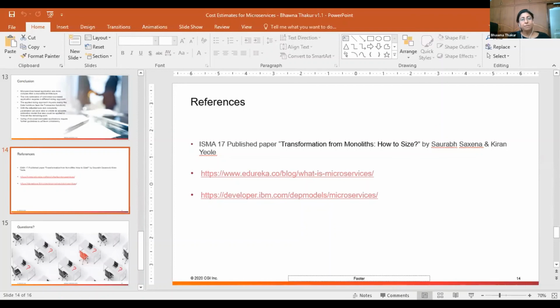So we should have a separate application boundary for each microservice. It doesn't give a productivity impact. Productivity still remains the same. It is language specific productivity. So that still gives us good, realistic estimates, unless parameters like requirements or the security levels are different, then only the productivity is impacted.